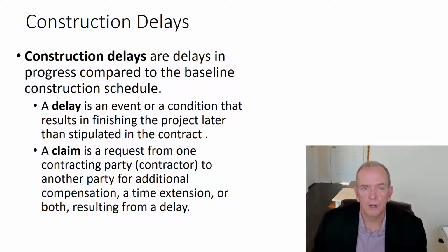Now, if it's reviewed by the consultant and it's accepted, then there would be a change order prepared. It would be signed off by the owner. We would have it signed off, and now the contract amount has changed by that $300,000 as an example.